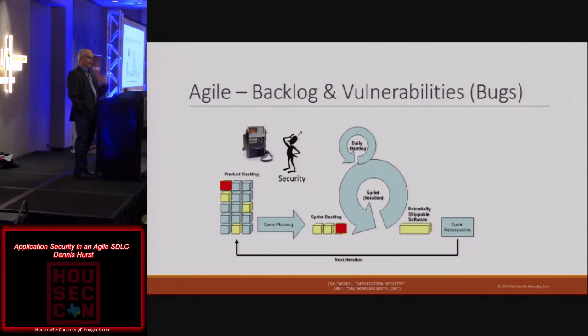The theory of that is, and what you need to ask yourself as a security team is, is this an activity which can occur once and be sufficient? For a threat model, that may make sense if you have a good enough architecture. Some activities, though, you want them to do on every piece of code, and remembering that they're building code, testing code, and having releasable code at the end of that process. So if I'm building 5 web pages, you want me to test those 5 web pages. You need to make that with every Scrum cycle.